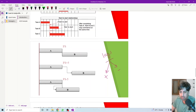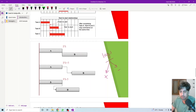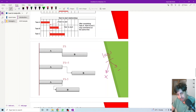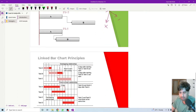For the negative lag, the lag value is minus five, minus two, or minus three — this is the number of days before the end of activity A. So activity B will start that many days before the end of activity A. Activity B will start five days before the end of activity A.